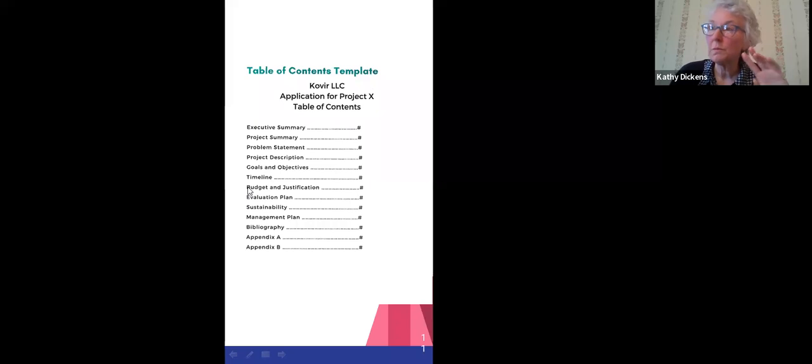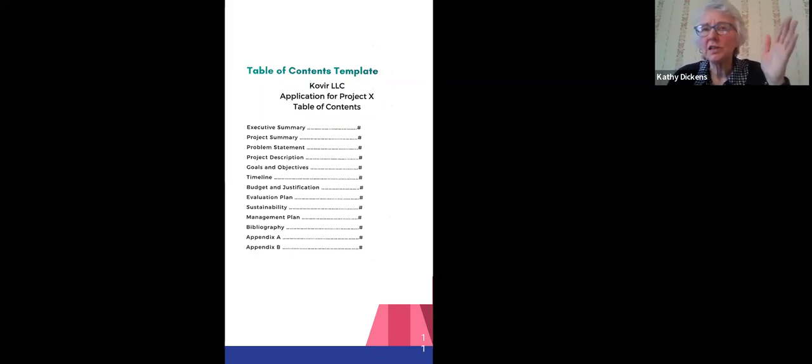This is kind of crucial too. In the budget world, as we review grants here at the Community Foundation, it is always very informative, but just a small scale grant, right? Like a teacher at a school is writing to put in a sensory garden. And so they don't just give us $5,000 from the sky. They've actually gone on the World Wide Web and they found this item, this item, this item, and they'll attach it. Like, this is kind of what we're looking for. This is what our budget is based on. Reviewers eat that up. It's like, wow, they've done their due diligence. These are warranted costs that they put in their budget, and it kind of seals the deal.